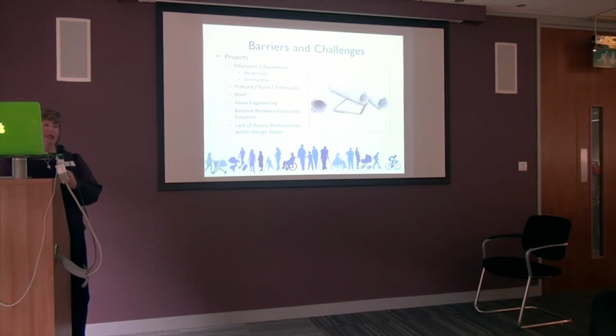Value engineering, it's a horrible term. Was in discussion yesterday via email and phone calls about a scheme, and I think the design team thought they were doing the right thing by providing a meandering path connected to a ramp, and we have value engineered out the associated steps. But what a lot of people don't realise, that not everyone can or would want to use an inclined surface, because it's actually really painful. And some people prefer to use steps where they can hold onto the handrail and actually make their way up the steps. So we've value engineered out that one, unfortunately.